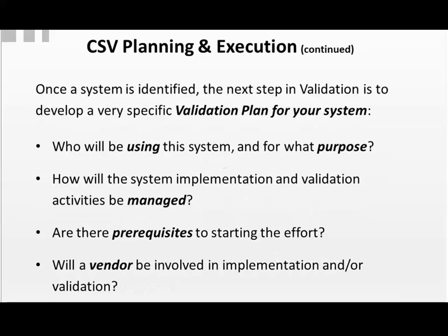Now, once you identify your system, go through your selection process, the next step is to actually write in detail your validation plan for the system. Now, you can start the validation plan at the beginning, and if you have a template, it makes it much easier, through your procedure, indicating all of the life cycle phases that you'll have to take into account during the validation effort.